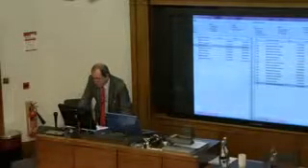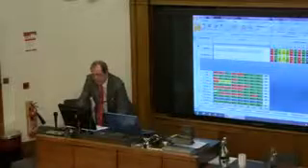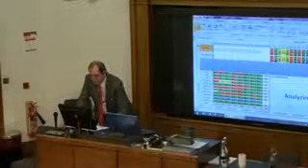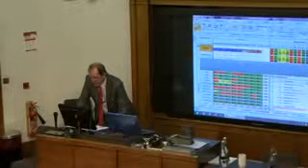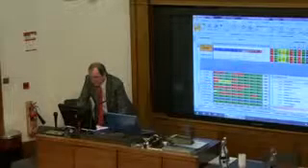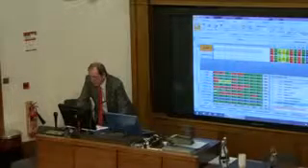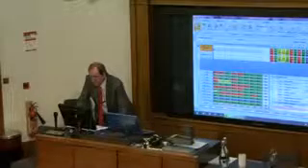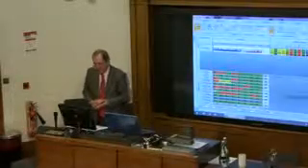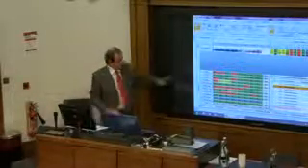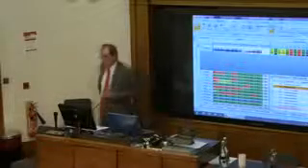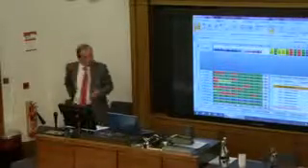I've lost my screen on this one. I can't press OK. Never mind. If I click into here, initial draft, I can select any activity along here and say, define strategy, and I can do a trace this way, which will show me all the activities leading up to that activity and all the activities leading from that activity.